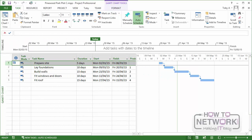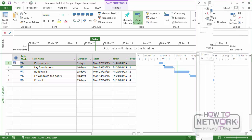So I've removed that constraint again. I've just got one more thing to say about constraints at the moment. We will be using constraints extensively during the rest of the course. It's very important to understand when it comes to scheduling a project that, generally speaking, constraints must be satisfied. And that if for some reason Microsoft Project can't create a schedule without potentially breaking constraints, you'll get messages similar to the one that we saw just now. The planning wizard will say to you, you can't do this or that will happen. And then you're going to have to make a choice between normally two or three options to decide how to proceed with your plan.